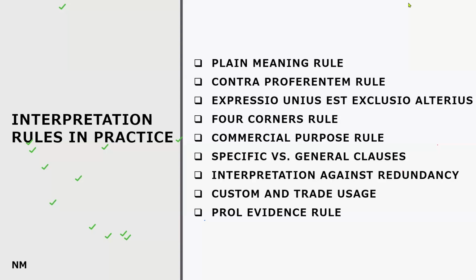So think about sub-clause 2.1, the possession of site. It says if the employer failed to give the possession of site, the contractor, as a remedial action, will be entitled to time and cost plus profit. Okay. And the same thing happens with 1.9 also, delayed drawings. If the drawings were delayed, the contractor is entitled to time, cost, and profit, three things, right?